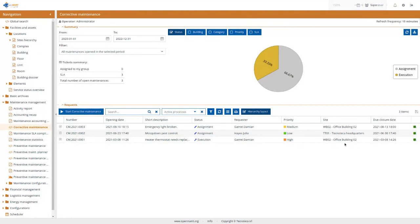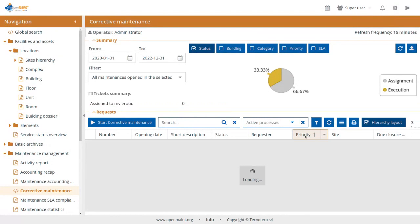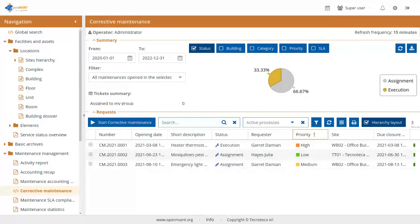Maybe you and I and Jeff should just talk about hierarchy of safety documentation, just to make sure we're clear. Because what Sergio asked is sometimes put in a hazard analysis process or a documentation, might be in the procedure, or it might be a critical lift procedure or something like that, right? And so it has the capability of doing that. Maybe we figure out just how we make sure all that documentation is given to the people that actually are doing the work, right? Absolutely, yes. We have to decide what documents we are tracing to each of these activities and what preparatory activities need to be done. And yes, we can also make that before anything happens, someone from safety has to tick off the activity. So the levels must always be present depending on things like this.